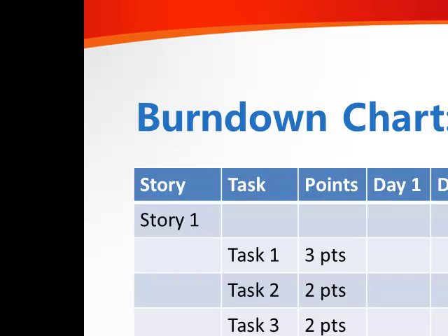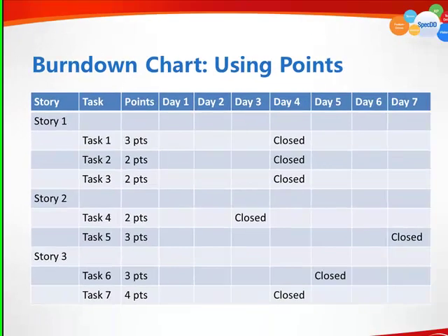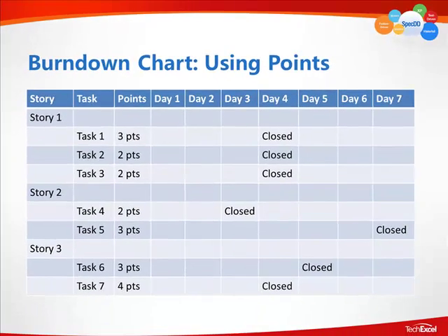The reason behind this, point systems for burn down charts, they do not need to be estimated at such a granular level. And a point will not be the same as 1 day. That metric, that ratio does not mean anything. This is not a 1 point per day kind of system, because the values of the points do not coincide with each day.